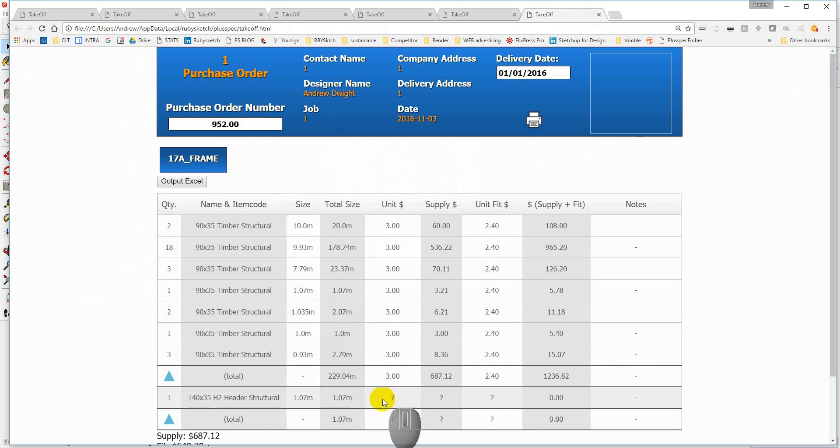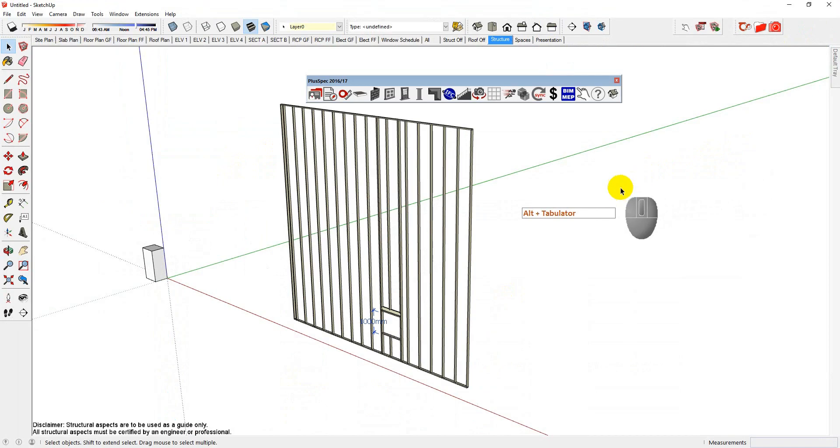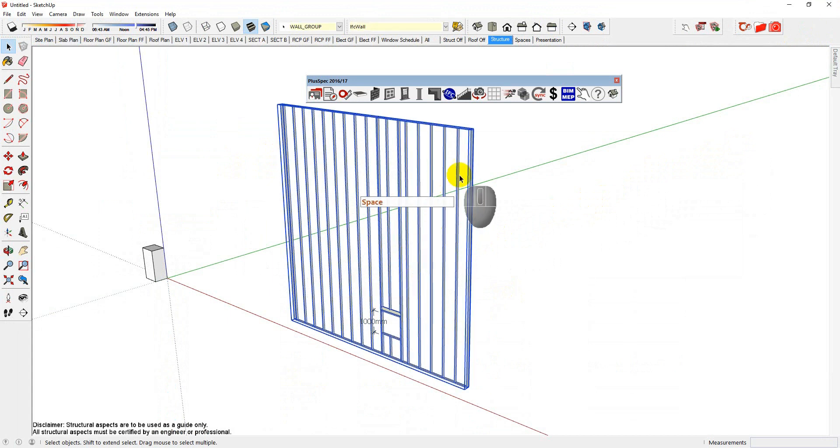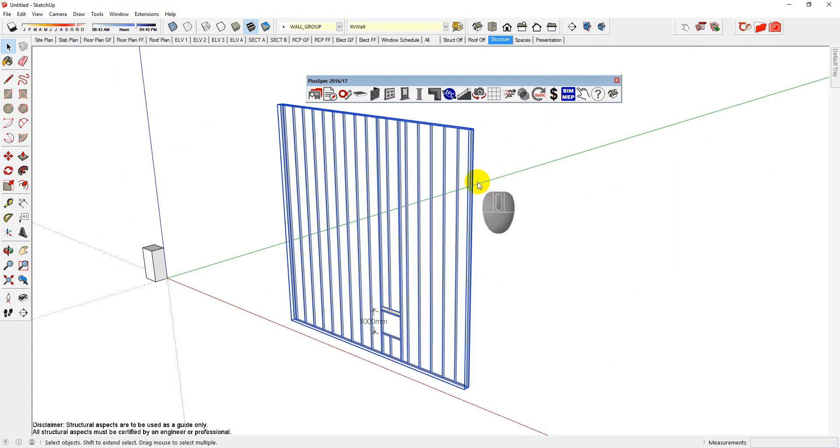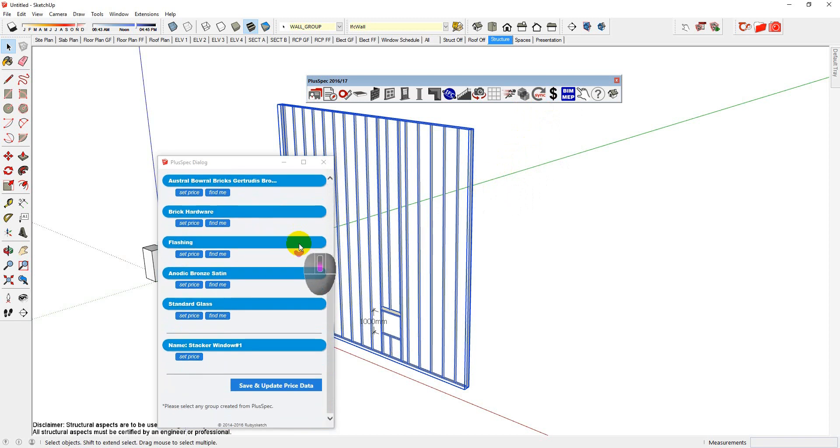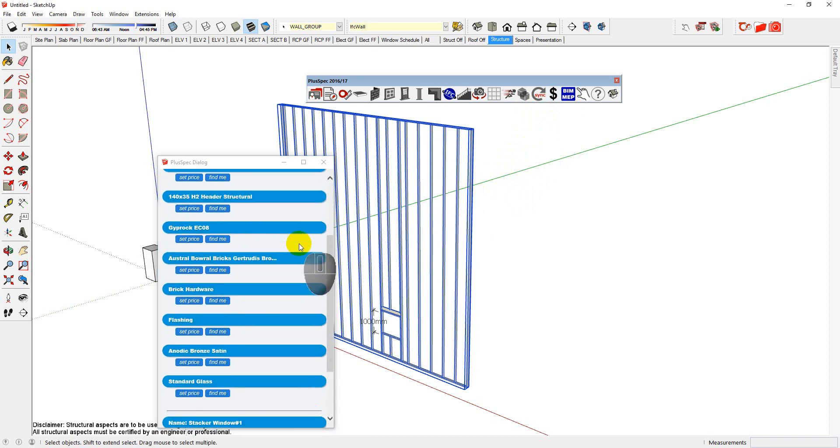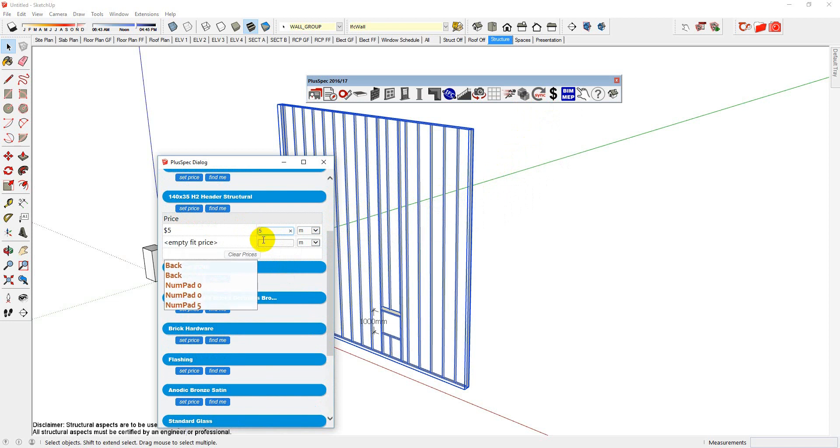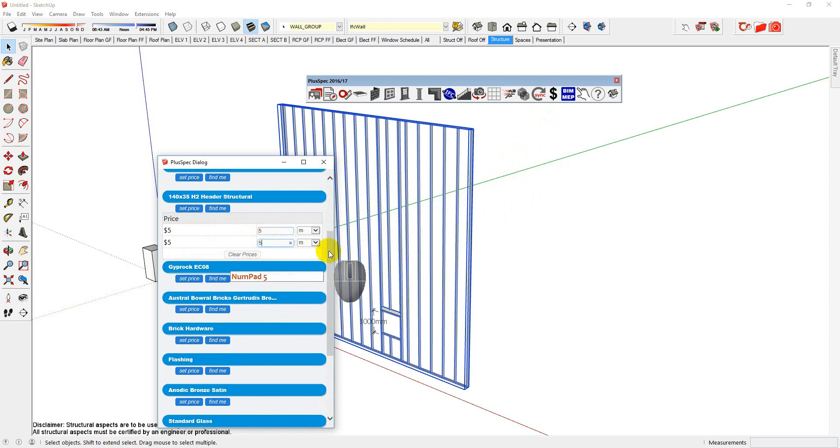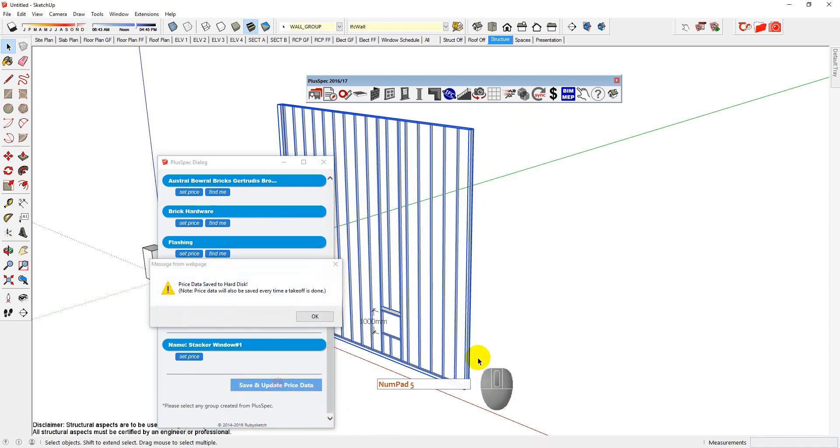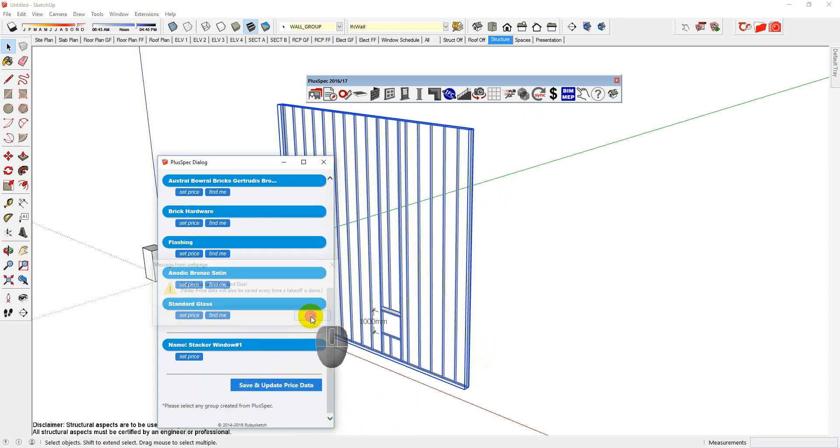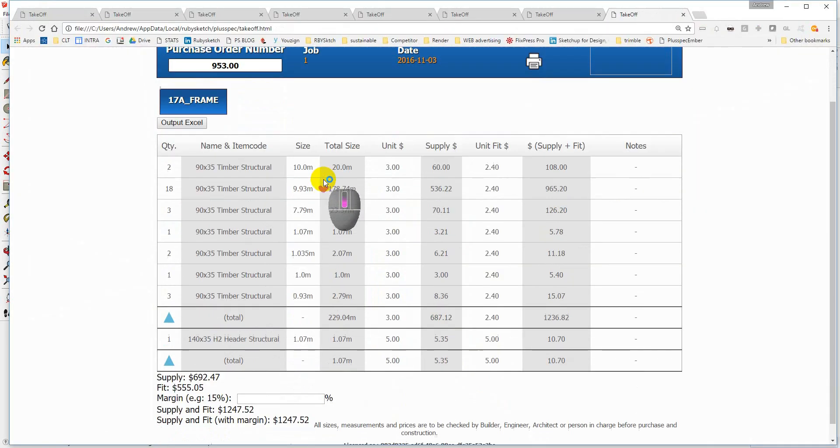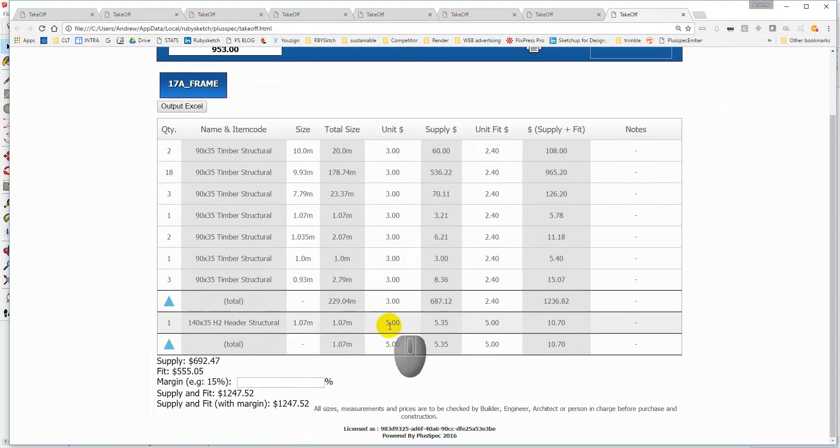So essentially, we can turn layers on and off to be able to associate prices. If you ever see anything with a zero value, it means I haven't put a price in it. So if I went back to my model and selected the wall. And go to my prices. I can quickly go down to my timber, which I think is $140, and set a price. So you can look up a price for this. I'm going to say it's $5.00. And I might charge $5.00 a meter to install these kind of things. Save and update price.